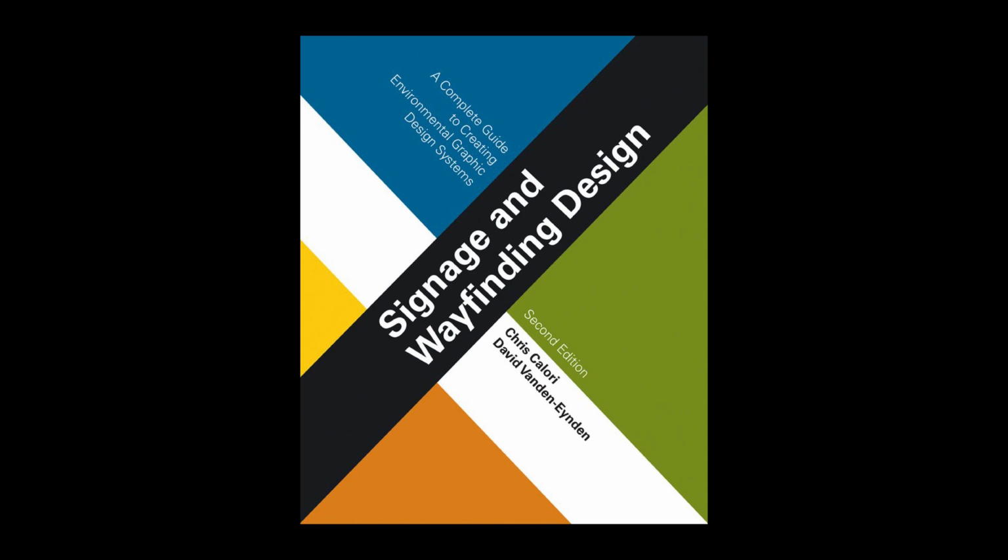It's important to note that most EGD practitioners are typically trained in graphic design. Since they don't have training in engineering or architecture, they are not qualified nor licensed to perform either of these services. Signs, particularly those that are large, electrified, or similarly complex, and their connections to adjacent surfaces, need to be engineered.